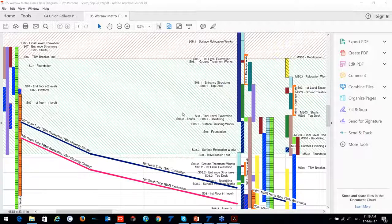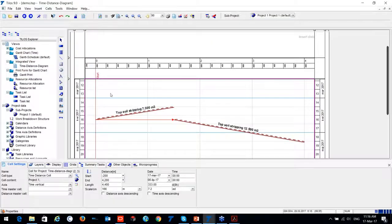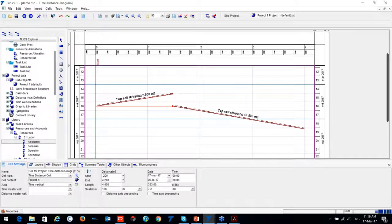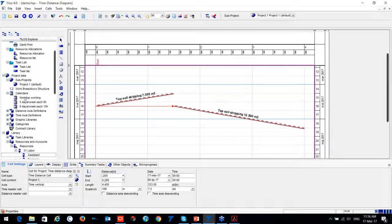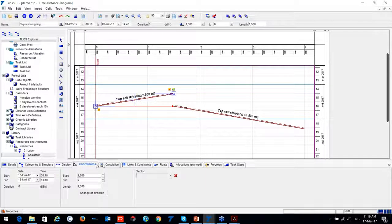A question about special calendars with holidays or special days — yes, of course you can have special calendars and display them in TILUS. Multiple calendars are supported, and you can assign a different calendar to each activity.